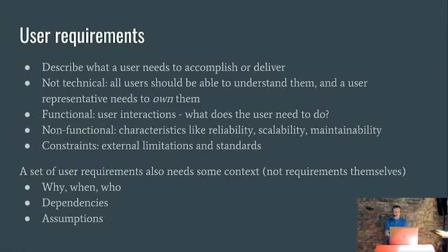For me, user requirements describe what a user needs to accomplish or deliver. They should not be technical. All users should be able to understand them, and some representative of the users needs to own them. And that bit is quite important. The users themselves need to take some responsibility for these requirements. As a developer, we should not be owning the requirements for someone else.